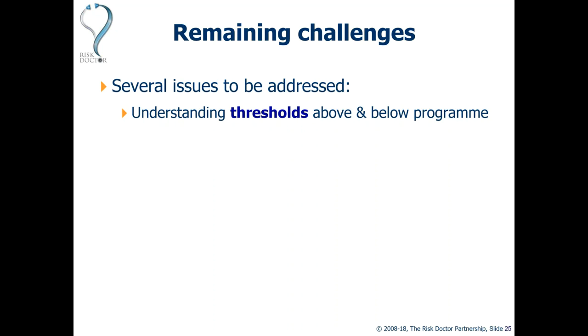If we don't understand risk thresholds, then we might find that we're escalating and aggregating from below risks that should really be managed at the project and component level, or that we're accepting risks from above that really should be managed at the strategic level. So it's important for us to understand what those risk thresholds are. There are techniques and approaches to developing and understanding those based on risk appetite, which we don't have time to discuss just now, but which we need to understand.